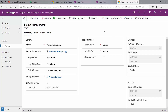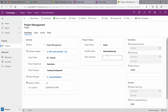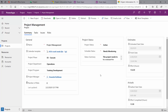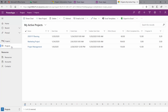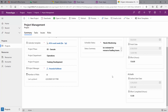I'll click on my project management project. You can see we have a new layout now. Once you click Save, it takes place retroactively for all projects using this form. Everything is immediately editable when you click on it — no open-for-editing step. I'll leave the status as Active, set this one to Needs Monitoring, and add a note: this project needs to be reviewed for resource loading issues. Then I'll save my changes.